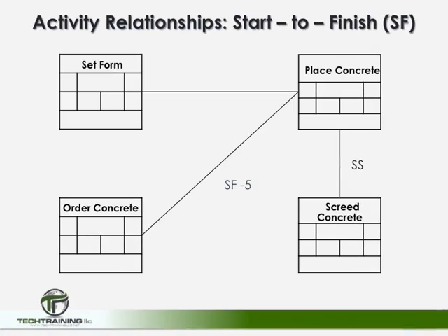An easy way to depict this is as shown here, and what this schedule is showing is that the forms have to be completed before the concrete can be placed. Therefore, setting the forms and placing the concrete is a finish-to-start relationship. Again, the forms have to be completed before the concrete can be placed.